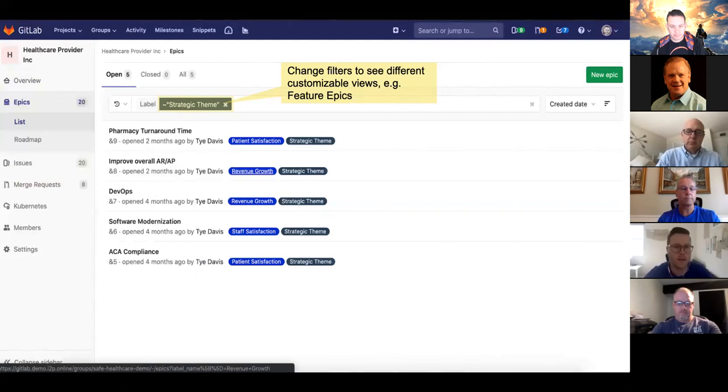We look at the hierarchy of GitLab as with common terminology in the Agile world. You have epics, features, maybe user stories. So the way GitLab does it is we have epics, sub-epics, and issues. It can be seen as that three-tier hierarchy there that's often seen with other Agile tools, or just terminology in general.